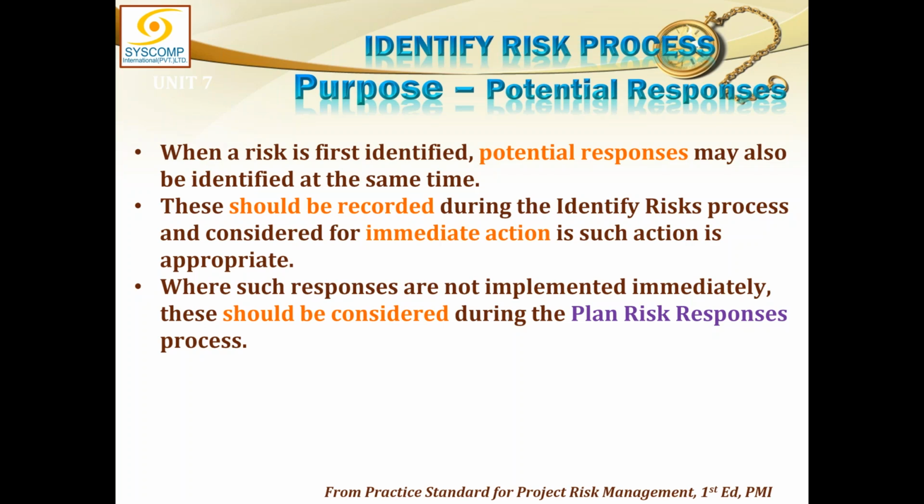Otherwise, at a later stage, I may have to get back to those stakeholders for collecting further data. So as much data as I can collect at the time of identification, I must collect that. One of that is potential responses. I also can ask more questions about what they think is the probability of this risk happening, and how much damage it will cause. So maybe qualitative and quantitative data also, if possible, can be captured. That is the right time, at the time of the identification of risk. But I am not making it a mandatory effort. You may not get this information about every risk. So at least identify the risk and try to capture as much data as possible.